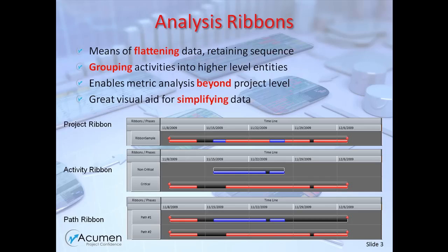In a similar manner, being able to understand the relative risk exposure within our project by perhaps WBS, location, or discipline is much more valuable than looking at risk exposure as a whole. Additionally, through what is known as path analysis, Fuse can determine all activity paths between any two given milestones, thus providing powerful analysis with regards to upcoming work and associated issues. Ribbons can also be segmented by phases, providing time-based analysis such as project trending and true project performance measurement.